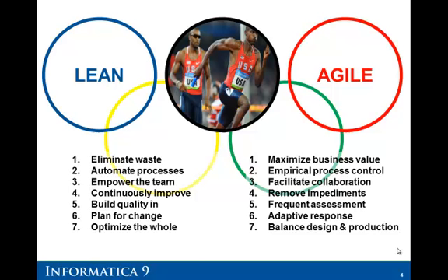Take a more empirical experimental approach with frequent iterations. Agile recommends 2 or 4 week iterations, and that will enable you to adjust and adapt as you go along to reach your goal.